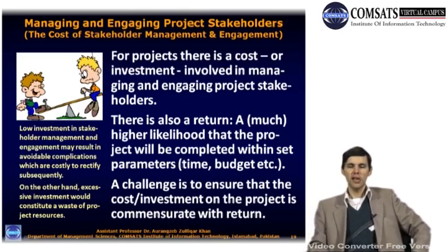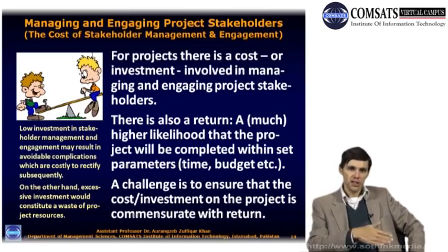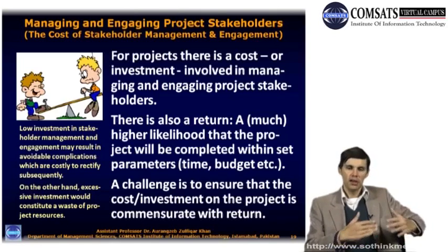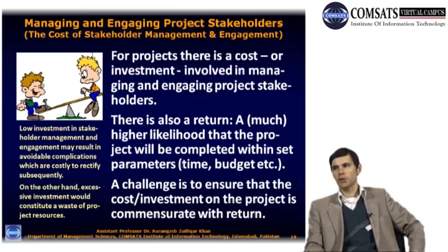Of course, one has to see that the cost investment is commensurate with return. If it's a very small project, you would not like to spend twice or thrice the budget of that project on trying to manage and engage your stakeholders. It all has to be done within the project context. You have to look at that carefully. A small project will require less effort, but a very large mega project costing billions and billions of dollars, you will have to spend a fair amount on managing and engaging your stakeholders.